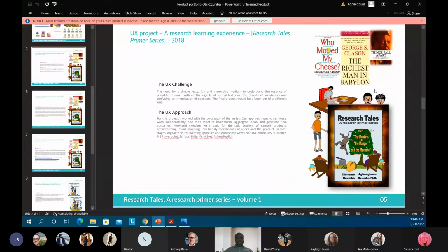So to speak, I'm determining who my user is at each point in the project and what product that user needs from me for an okay at each point in the project. That for me is a big lesson there. And that had to be done because without doing it, I've run around in circles, having endless meetings, trying to convince people, having a lot of pushbacks, and not making any progress at all.